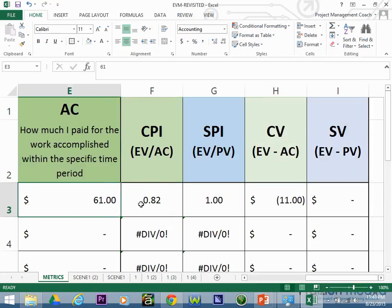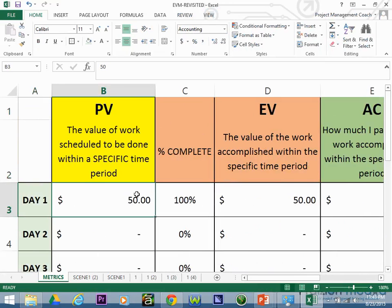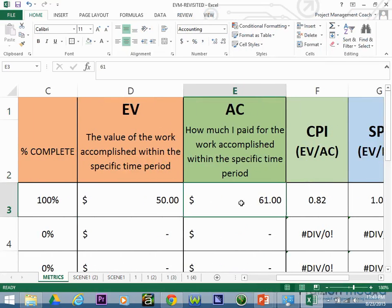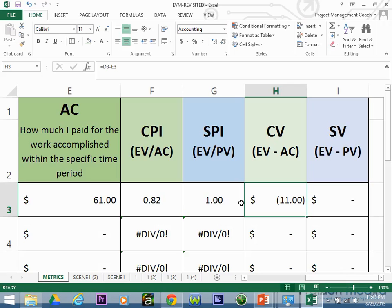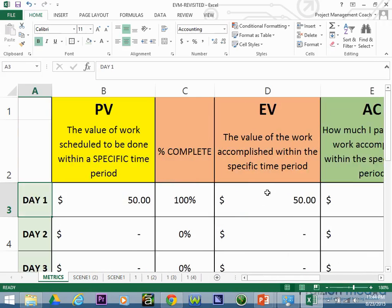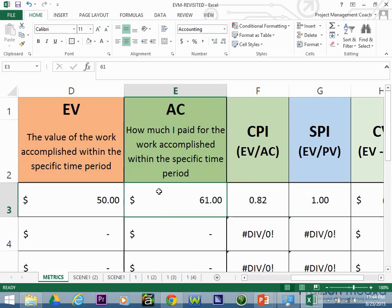At the end of day one, our core metrics were: PV fifty dollars, EV fifty dollars, and AC sixty-one dollars. When you put these values into the formula, CPI comes out to 0.82 — that's bad, meaning we are spending more than we're getting done. SPI equals 1, meaning we accomplished all the work scheduled for day one. We got the work done but spent eleven dollars more.